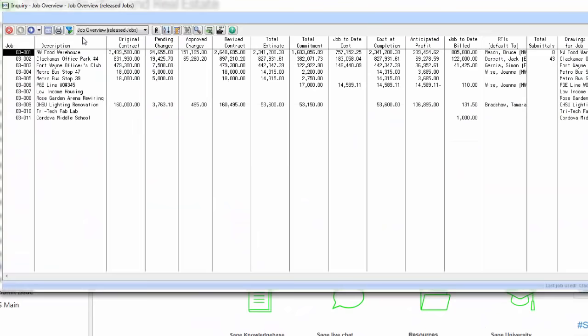Within an inquiry here in project management, I'm going to show you the job overview inquiry. Within this inquiry, I can see all my active projects and most of the information that I would want to know about a job. What my original contract is, if I have any pending change orders, what my total approved change orders are, my revised contract amount, my total revised estimate, my total commitments. Commitments are subcontracts and purchase orders, my job-to-date costs, what the system calculates as my cost at completion, my anticipated profit on this job.